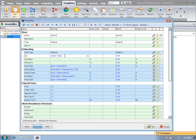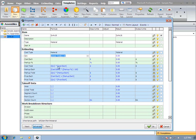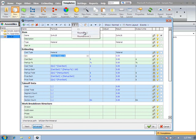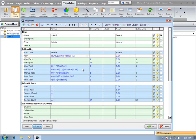If I wanted to then take my 16 feet so that I get a piece count, I would just enter in linear total divided by 16. Now if we want that to be a whole number or round up to the nearest whole piece, I can select that text, come to the top with a double parentheses, and select round up. This will give me a whole piece count, eliminating the decimal, such as 2.5x2x4x16.